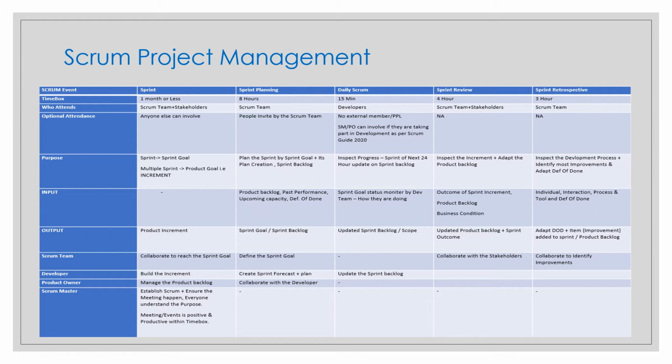A common topic of confusion is the definition of done versus acceptance criteria. The definition of done tends to be more technical, talking about code quality, code coverage, security, and best practices based on the product, and how many code reviews are done, and so on. On the other hand, acceptance criteria are specific to a particular item, and they try to describe when an item is complete, mostly from the functional perspective, whether I can do this or not.